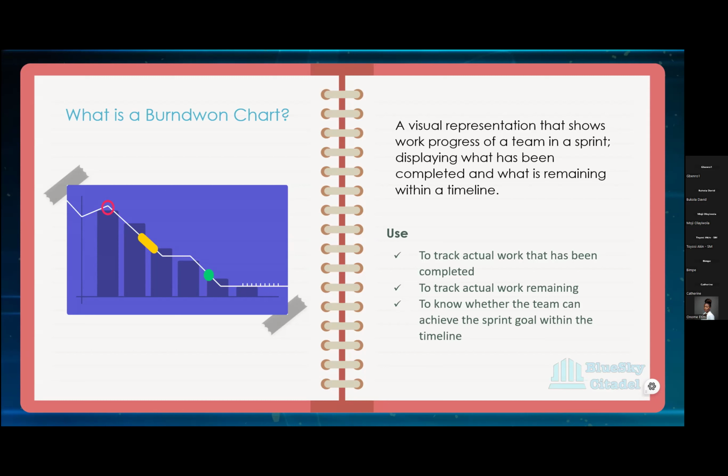When you have 26 stories on the board and something like 89 or 90 or 100 tasks, I know that you can't keep track of everything, but the chart will help you to know when something has come into the sprint, because the bar would shoot up, and you'll be able to know that, okay, somebody has added something to the sprint, and you're able to talk about that during the stand up. You find it out yourself, and then you're able to talk about it. What that helps your team to know is that you're on top of things.